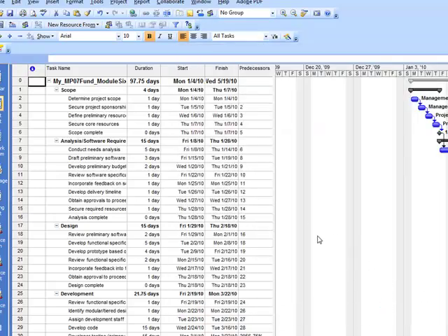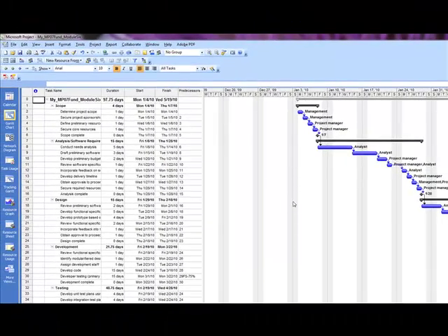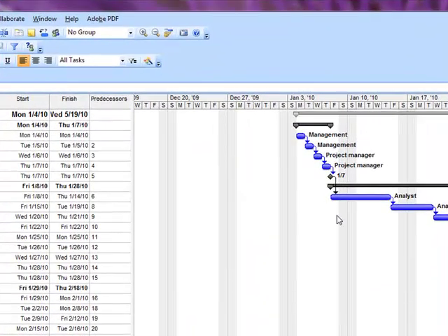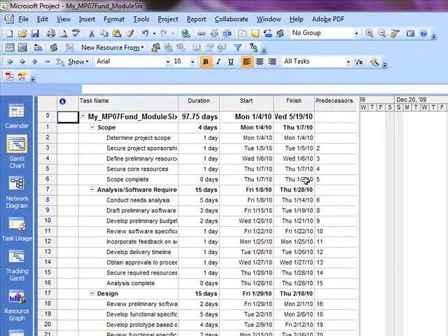So even though we did that, as you're looking at your schedule, you may be looking at this and saying, well, it didn't make a change to my project. Shouldn't it be showing those as being non-working days? Well, we haven't reflected that new base calendar in the project itself. So that's the next thing that we'll do.